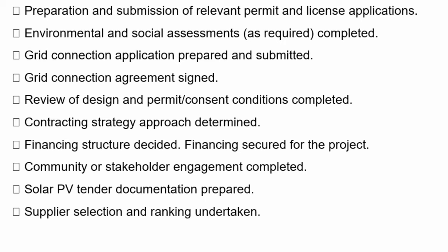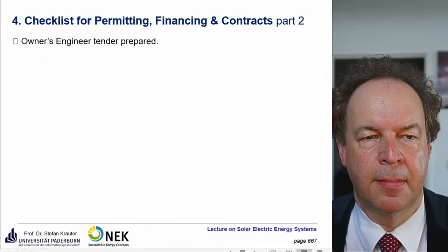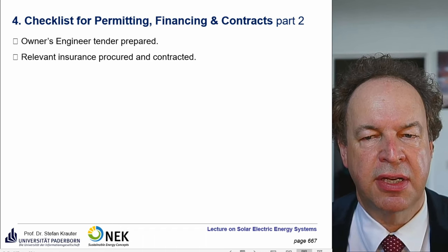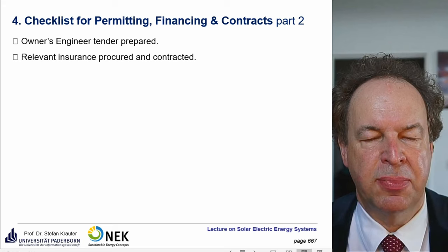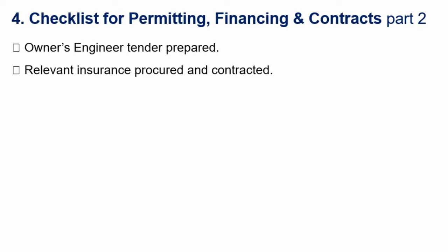Supplier selection and ranking — you don't use just one supplier, you use several, usually minimum three, ranked depending on quality, price, and whether they can keep the time schedules. Then the power purchase documentation prepared. Then the operation and maintenance concept and contracts are prepared. The owner's engineer tender prepared. Relevant insurance is procured and contracted — against theft, exceptional storms, earthquakes — what happens then with the power plant, is it insured or not? All of this has to be evaluated, procured, and contracted.